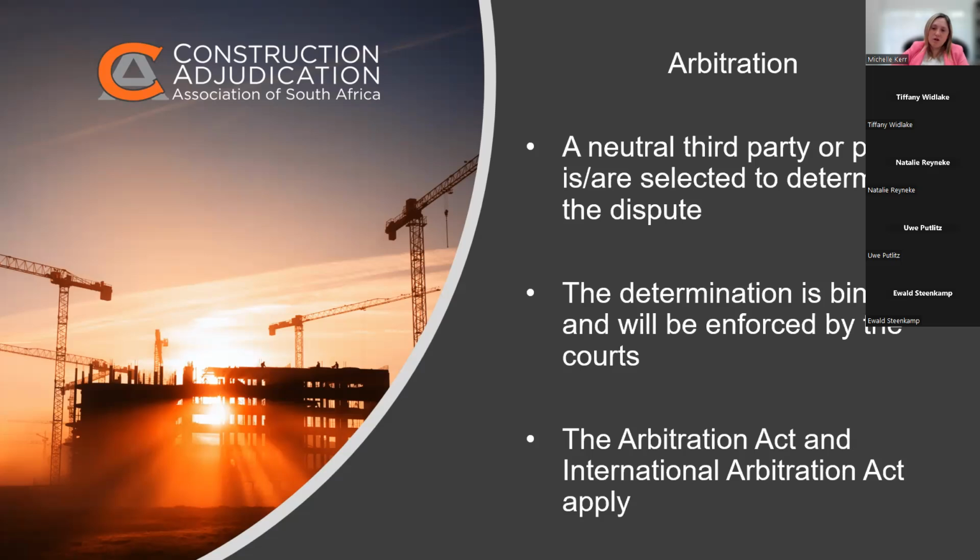So it's a very good idea when drafting your contract to make sure you have things completed. Like if you've got to have an adjudicator, are they appointed in the contract or will somebody appoint them? Who's going to appoint them? If we're not going to be able to agree that as parties between ourselves, we need a nominating body. We have to have that nominating body named in our contract, because at a later stage, if we try to enforce this provision and the nominating body isn't named, and parties can't agree on the adjudicator, we're not going to have an enforceable provision because we have no mechanism to enforce the appointment of the adjudicator.